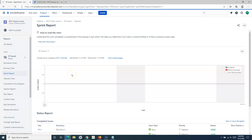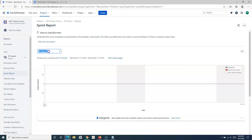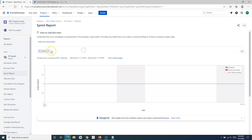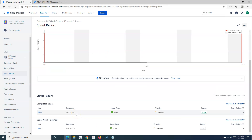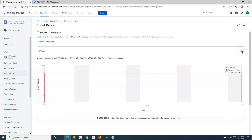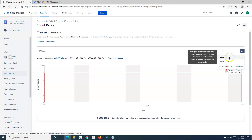In the Reports section, go to the Sprint Report. Once you go to the Sprint Report, it will show you the closed sprints. I have already closed Sprint 1 and Sprint 2 for this RCV classic scrum project. I can then select the sprint that has been closed — for example, RT Sprint 1 — and go to the ellipses (three dots) on the right-hand side.